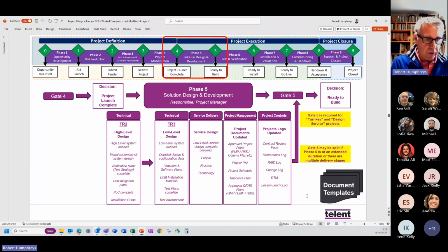We're always looking to make sure we're not just looking forward, but that as we get to each stage gate, whatever it is we should have achieved at that stage, if we haven't, we report by exception. We make sure we have a plan for it, and you don't get through a gate unless you can demonstrate that we've got a plan to address anything that was outstanding.